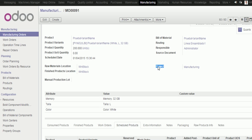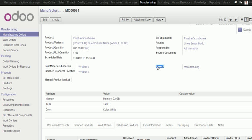each time you configure a project, a new analytic account will be created related to that project. So, we use the standard Odoo analytic structure to collect all related costs to manufacturing order.